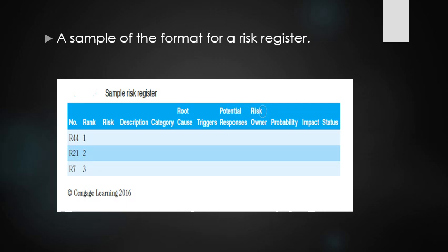Trigger for each risk. Triggers are indicators or symptoms of an actual risk event. For example, cost overruns on early activities may be a symptom of poor cost estimates. A defective product may be a symptom of a low quality supplier. Documenting potential risk symptoms for a project also helps the project team identify more potential risk events.